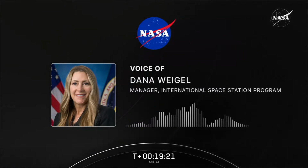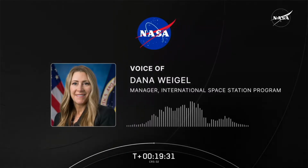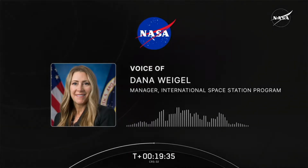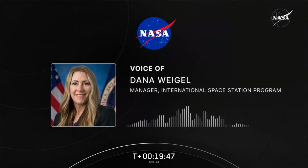Well, we have hundreds of researchers worldwide and a large industry supply base across the country who support our missions. Putting together a mission is a big technical and logistics challenge, from equipment manufacturing and deliveries to packing and integrating the cargo and planning and executing the mission. An additional challenge for this mission was the late manifest changes that we had to make to adjust to the loss of the NG-22 Cygnus mission that was originally planned to fly this summer.